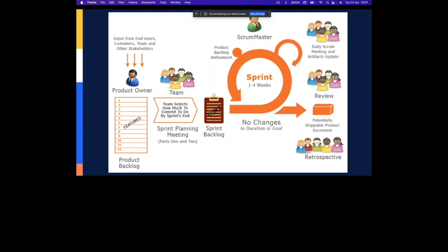There could be a product backlog, and there could be a couple of sprints, and the sprints can be loaded with the prioritized user stories. But when it comes to a sprint start, the sprint items are picked by the team from the top of the product backlog.